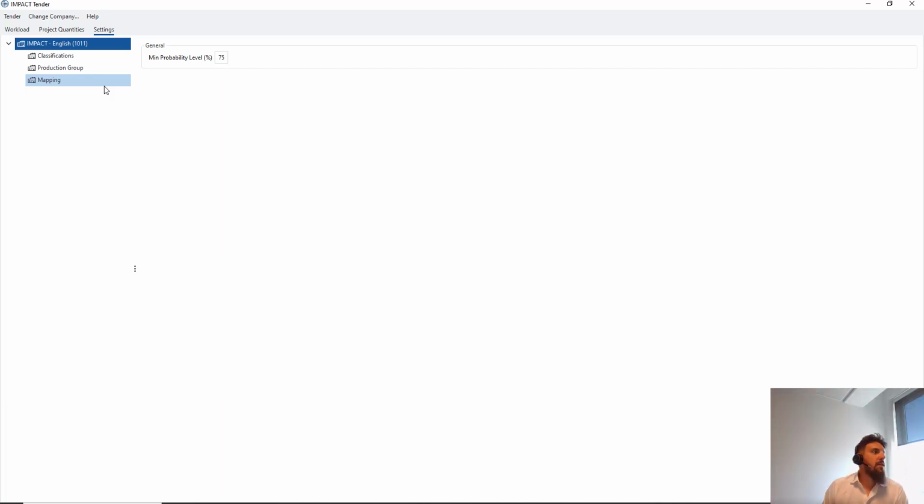And the tender capacity, or the rough capacity, you can then see in a graph alongside your actual rough planned elements, the fine planned elements, and the elements that are already on your table. So those 3 different levels. So far in Resource Manager, we had the level of rough planned elements and fine planned elements. Now we're adding an extra layer to that, and that's the tender elements. The elements are not in the software, and we want to represent them somehow. And that's the workload graph we will end up with at the end.